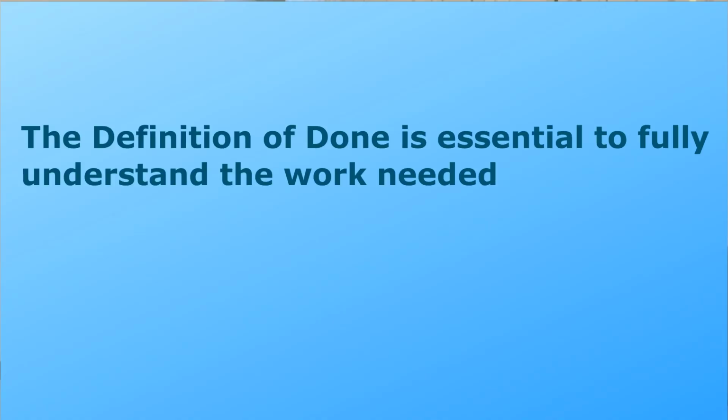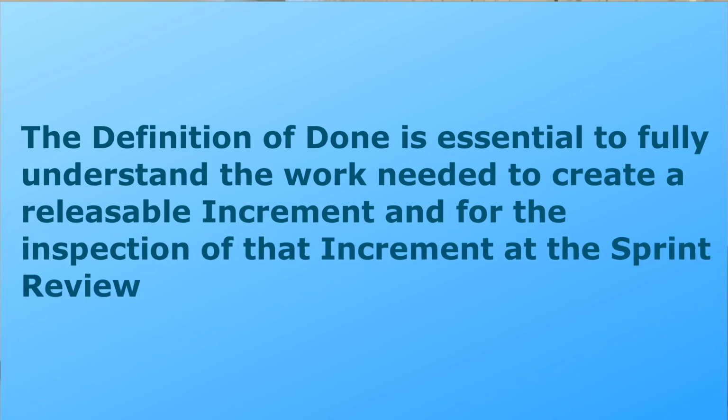In a definition of done, the conditions are expressed that need to be met by an increment of product in order for it to be shippable. It is an overview of all the activities, criteria, tasks, and work that need to have been performed on a working piece of software in order to be able to release it into production. The definition of done is essential to fully understand the work needed to create a releasable increment and for the inspection of that increment at the sprint review.